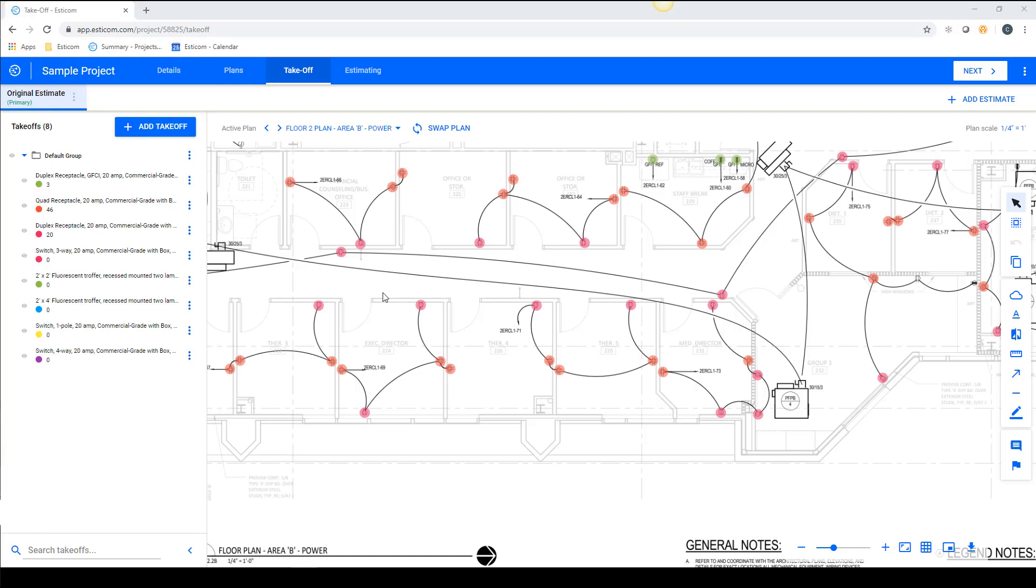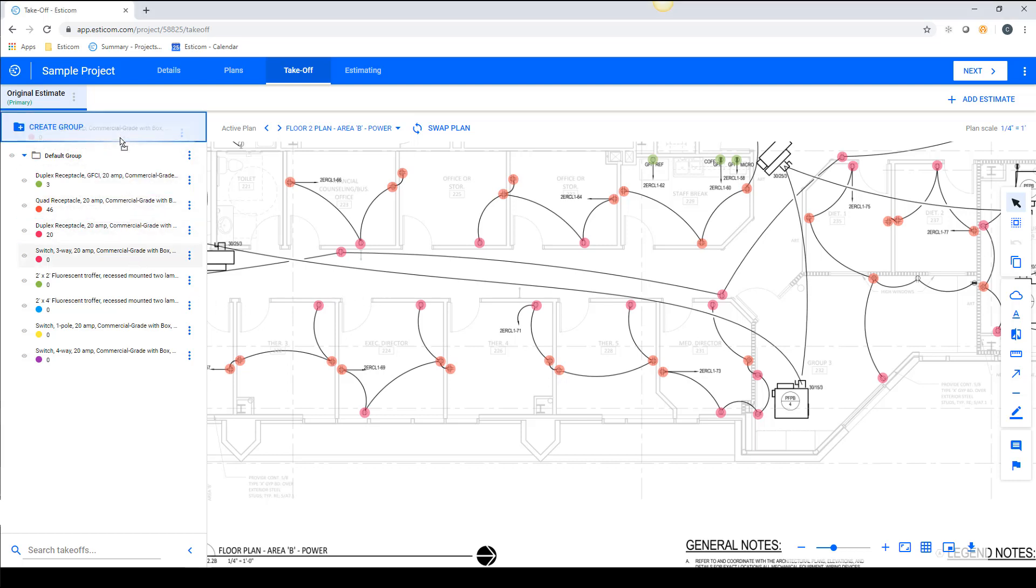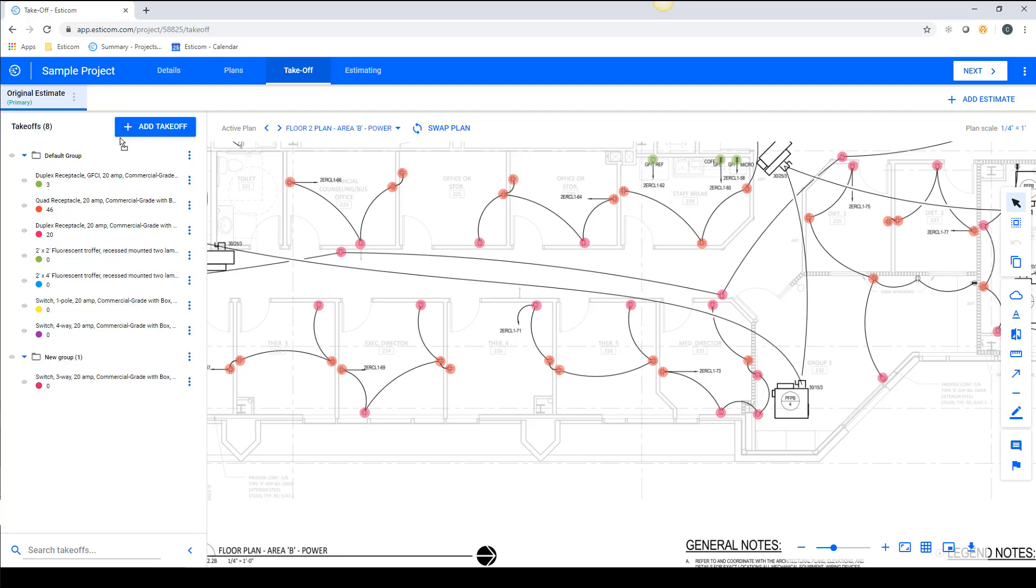When estimating a project, it's helpful to break up the project into smaller groups of items. You can do this by dragging a takeoff towards the top of the takeoff menu. You'll notice a Create Group button appears that's used to create a new group.